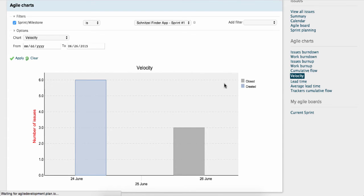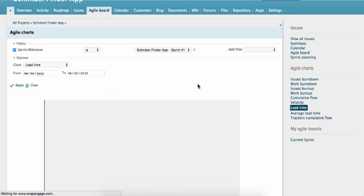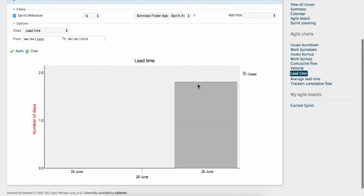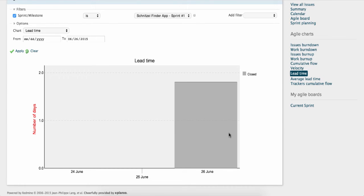The lead time is the time between an issue being opened and an issue being closed. Teams using the Kanban approach often favour this method over the Velocity chart and they'll focus on improving the lead time rather than Velocity.